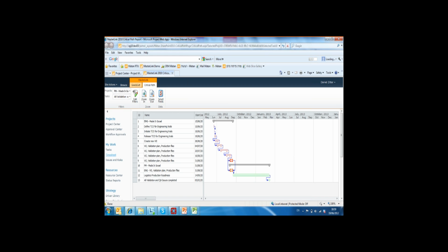All right, we have one other question in the queue, the last one we've got for now: how does this relate to timesheets for team members? Who is in control? In this scenario, it's very clear. The team manager is in control. Again, this is a weak matrix organization. Team managers, functional managers are the ones that are going to be approving hours. They're in control of almost everything.